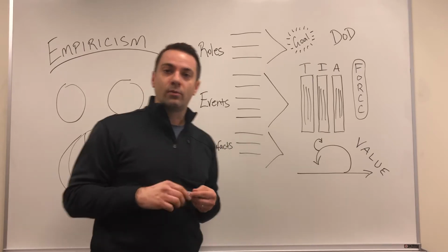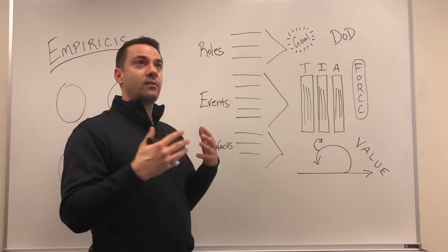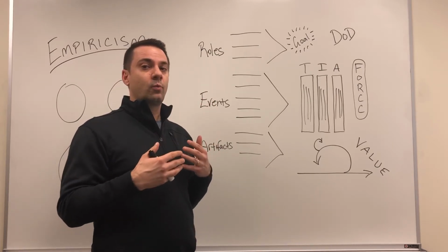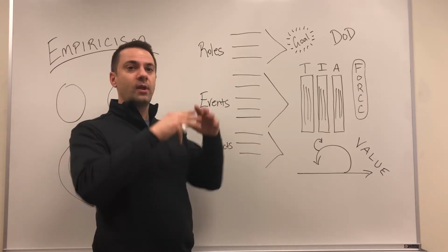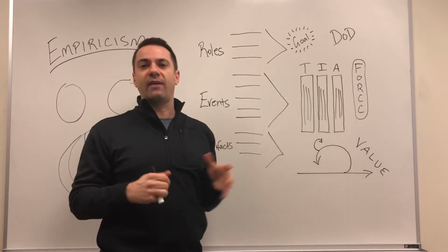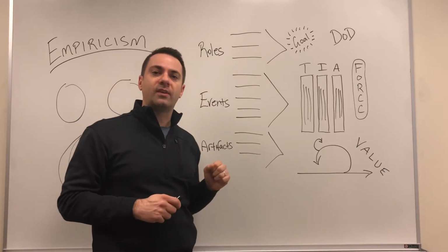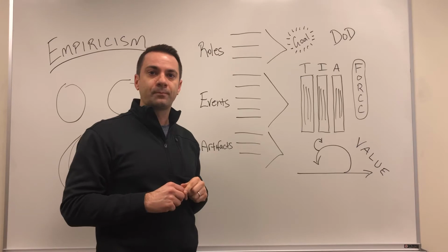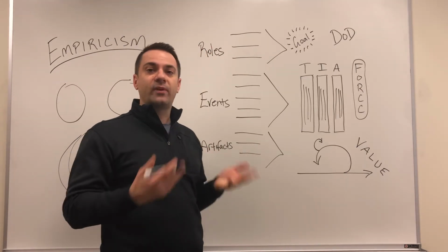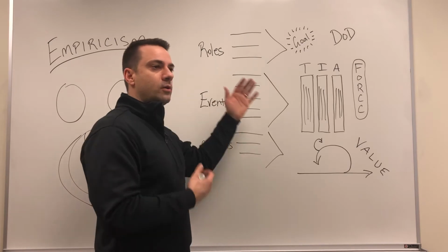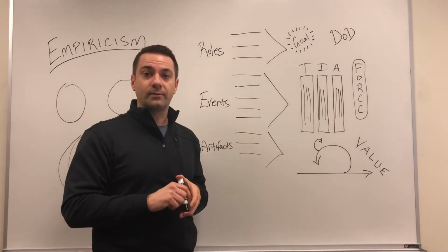So what did we do? We coached the team to figure out how they could fill those gaps. What did they really need? So empirically, what we did was we formed a matrix, a graph of all the skills that they thought they needed for this team and the work they were going to be doing. And they listed all their team members, and then they filled it out. Who's strong, who's intermediate, who's weak in all of these skills that they listed.